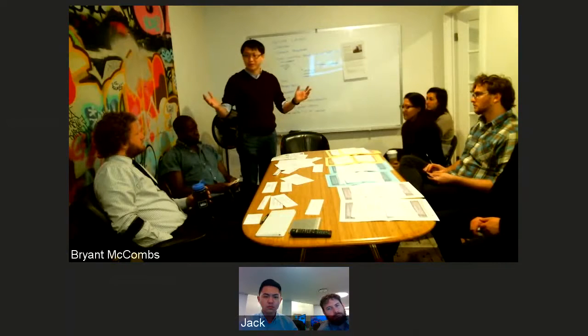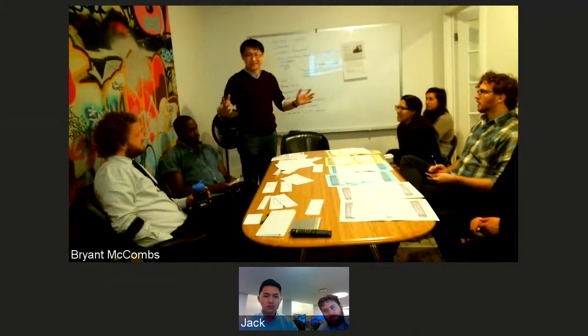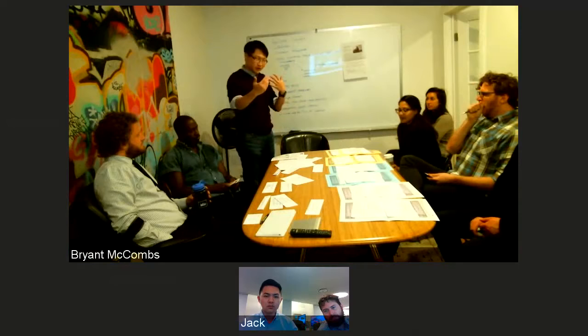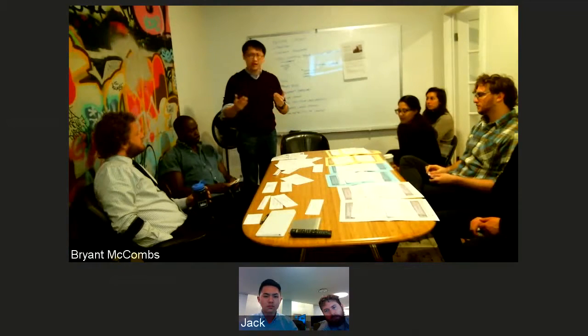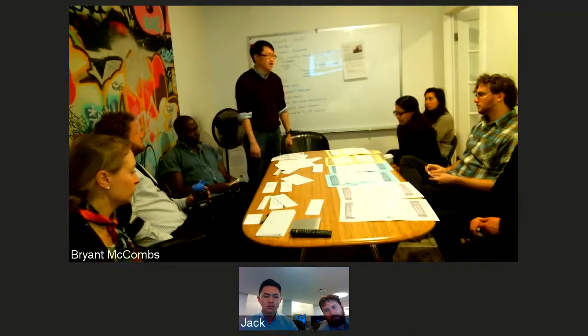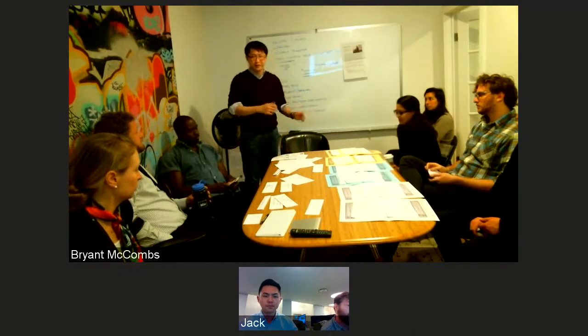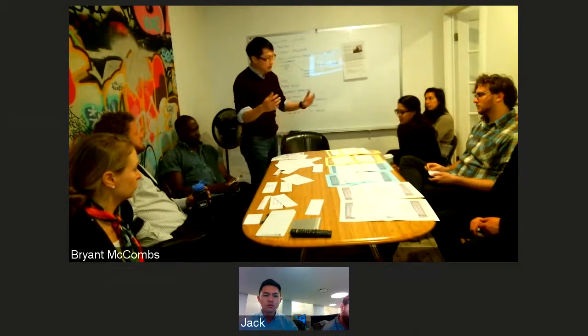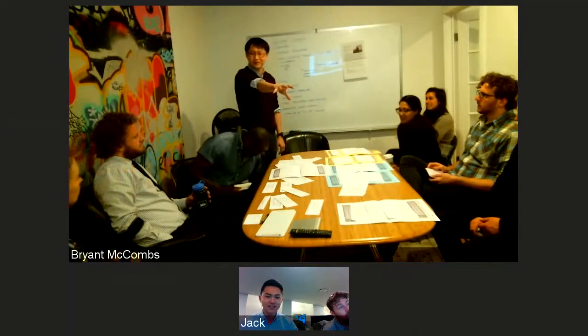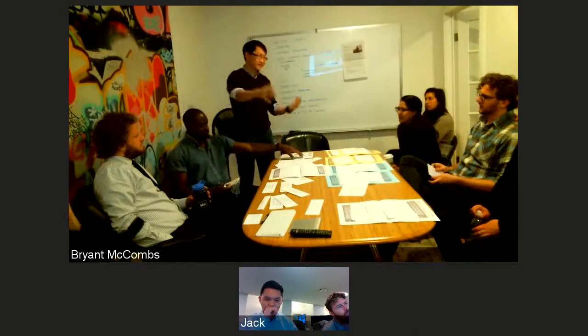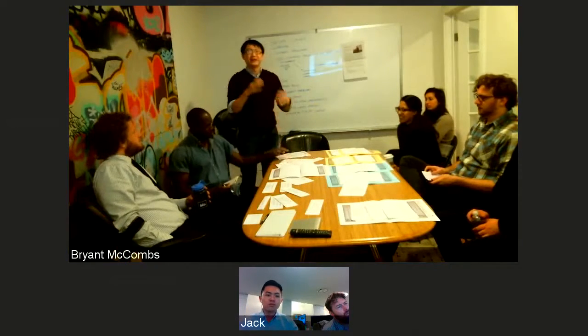And that's pretty much all there is to this system. This was a weekly event that occurred. You can also do things like, hey, I need more features in the open beta or in the initial beta. Okay, great. There we go. You got more budget in your initial beta now. You're going to have less budget in your final beta, or find more money to get more budget.